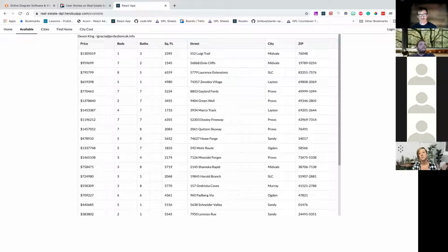I have a question. Do you typically want to overestimate anyway? I would say yes. Because that was my experience. I would always look at something and think, oh, I can build this. But take into account you might get stuck on weird issues, like a syntax error that lasts 4 hours, or some weird unforeseen problem that you didn't see.